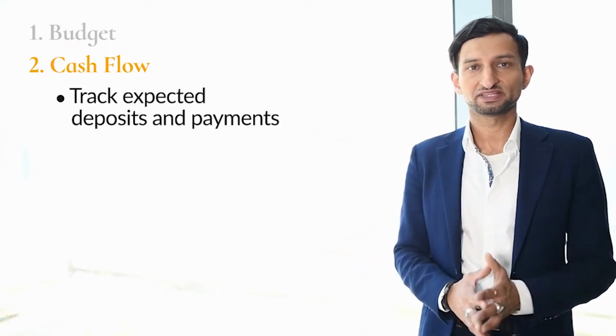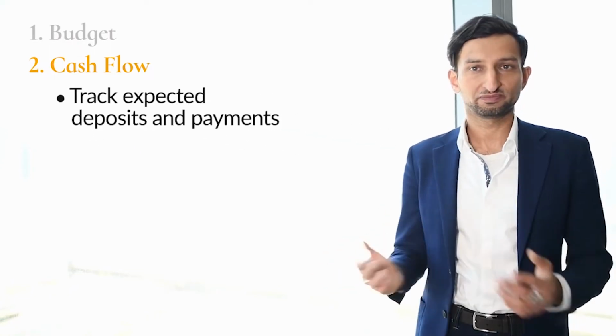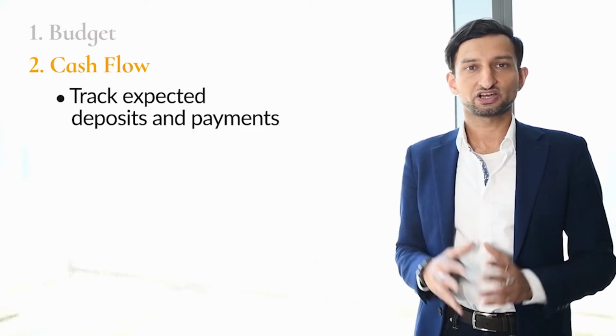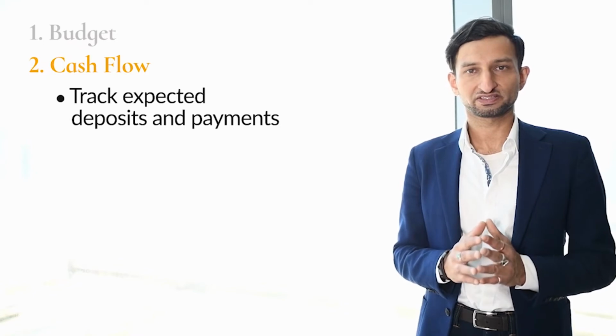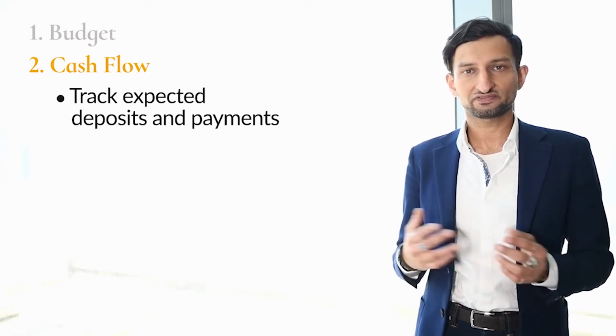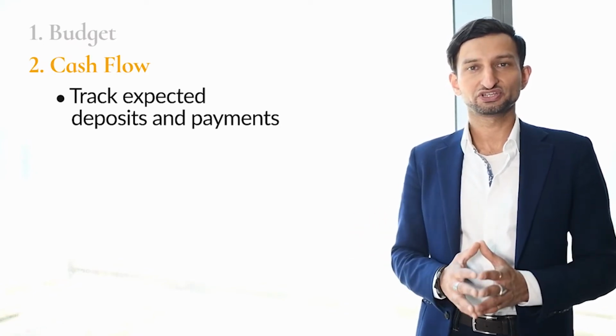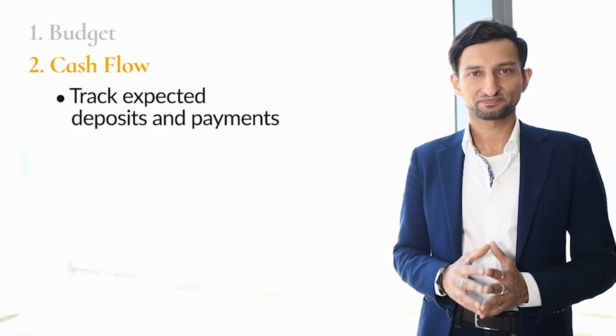For instance, some vendors work with retainer payments and deposits while others do not and only bill on a monthly basis. Most contractors also require some form of pre-construction fee or deposits, and subcontractors often require deposits just to procure materials in the early stage of a build-out.